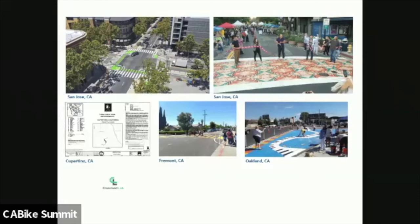One last thing, the two projects in the city of Glendora took away parking. The class 4 bike facility was diagonal parking originally, and we turned it into parallel parking. And for the parklets, we just removed parking to install them. But going back to what you mentioned, it was the communication and engagement with the community to get them to buy in to the need for the safety improvements. If you don't get the buy-in, then obviously they're going to push back on the project. So having that early on is going to enable you to push that project forward.